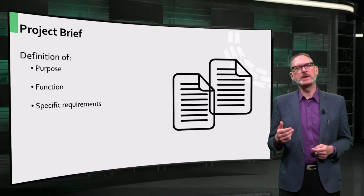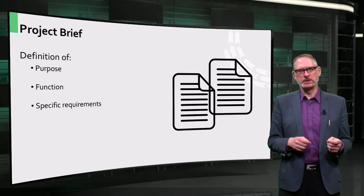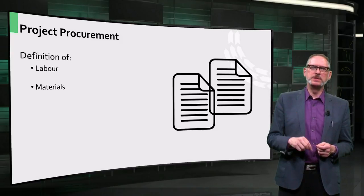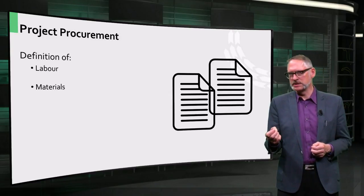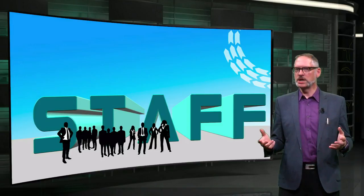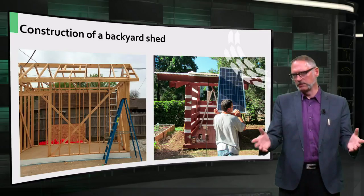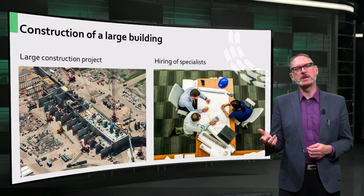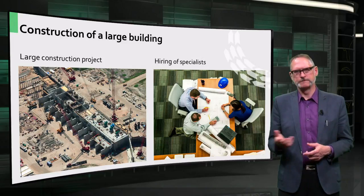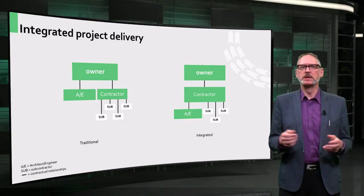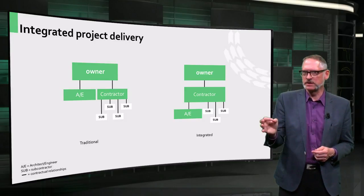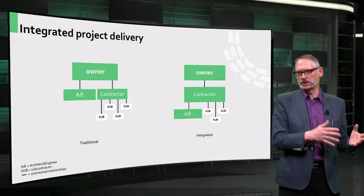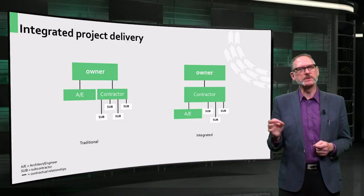Once the scope is determined, you can decide how best to procure the project. That is, you will determine in what form you will purchase the labor and the materials required to realize the project. You need to select the right people to fulfill the tasks and activities that together will deliver the building. For a garden shed, you might choose to buy a kit at the local garden store and assemble it yourself or with friends. For a larger building, you might hire an architect and then use the architect's designs to make a contract with a builder. Most projects are organized traditionally, meaning that the client contracts design services — that is, the architect and engineers — separately from the construction services. This allows the tendering of the contractor on the basis of the design as worked out by the architect and engineers, but divides the responsibility for the design from construction.